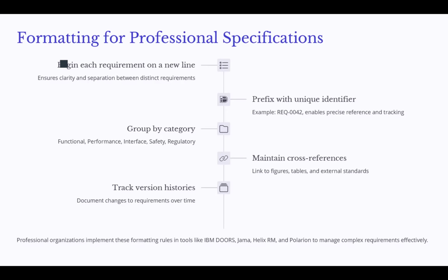that confusion. We have to track version histories. So some documents actually change requirements. Like you probably work with the standards. Every standard that you read has several versions. Okay, and you have to follow the last version when you're designing a system based on that standard or based on that document, not just standards. There should be regulatory kind of guidelines. So those documents should have track version histories, so everyone knows what the previous histories were and what change was made from the previous version to the current version.